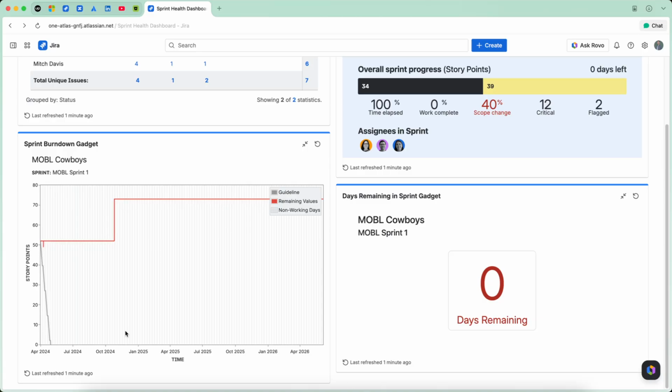But not only that, from that flat line, we also have this line right here that is extending, which is this scope creep change, where more work was being added to the sprint, which reached more than 70 story points, and that was also a disaster.